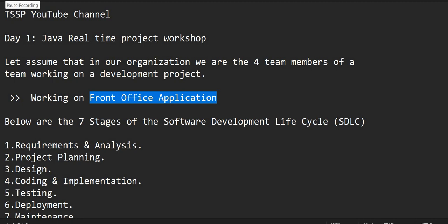And for forgot password, on the forgot click, I want to send a mail with some kind of code, using that reset URL link, and how a new password has to be generated and updated. That is also one story. That way we will come up with stories one by one, and those stories will be created as a backlog in Jira, so that after we create the backlog, we have a planning meeting.